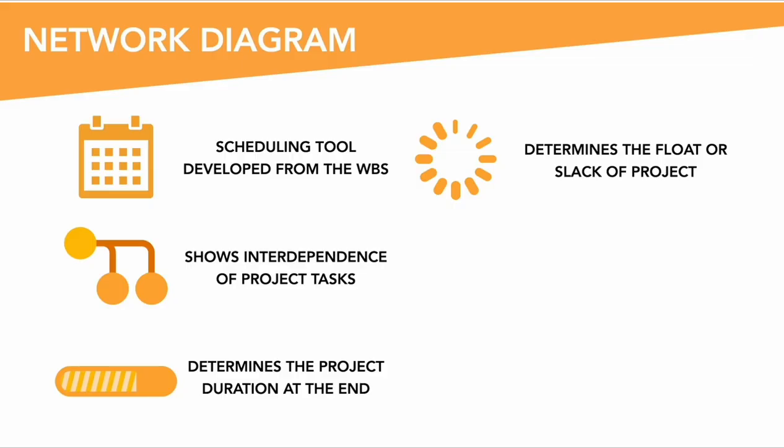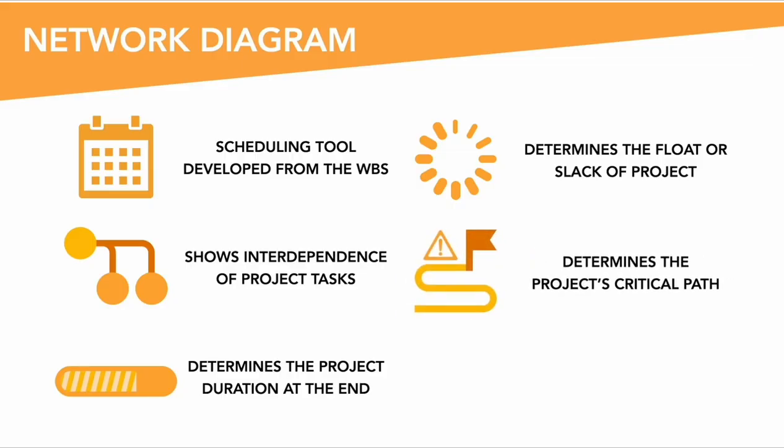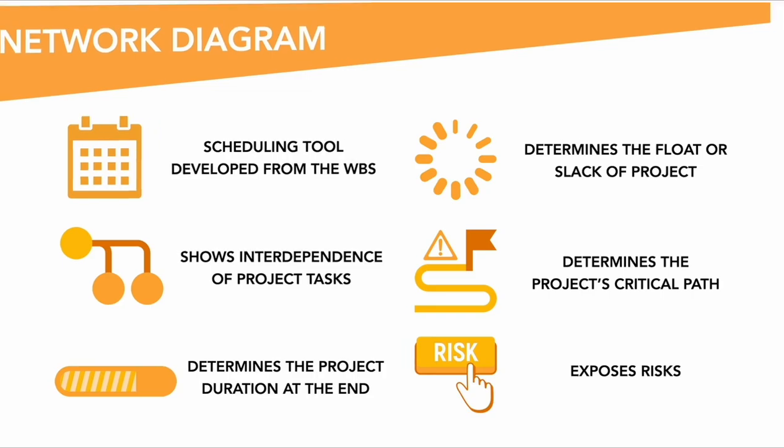the whole project. It determines the project's critical path, which is the longest duration through the network diagram, and determines the shortest time to complete the project. By creating a critical path-centric network diagram, it will expose for us the risks that are associated with the project.